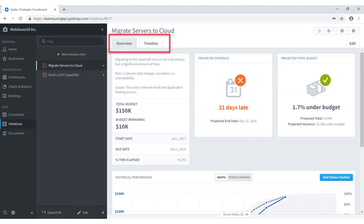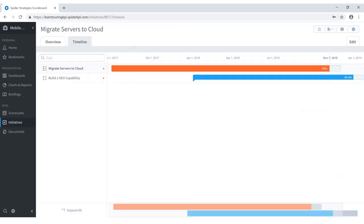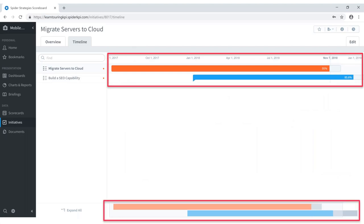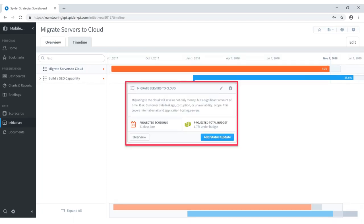There's also a timeline tab, which presents a Gantt chart-style view of your initiatives. Along the bottom is a timeline magnifier where you can drag and drop to expand or contract the time frame you're viewing. Clicking on a Gantt chart bar — such as the migrate servers to cloud bar — shows descriptive detail information as well as projected schedule and projected total budget, conveniently accessible right from the timeline view.